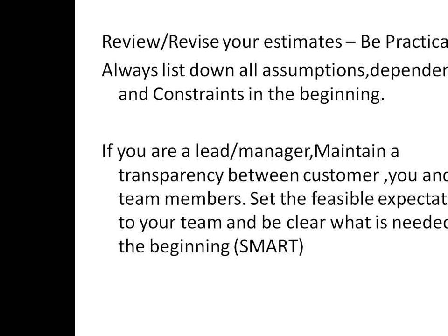Whenever you do any estimation, always list down all the assumptions, dependencies and constraints in the beginning. There is no IT project in the world which does not have any assumptions or dependencies or constraints, technical constraints or any other constraints. Dependencies, for example, it may be dependent on some technology for which the support is not available outside India. That is my dependency. If the support is not there, I cannot work further. So always keep assumptions and dependencies in your mind.